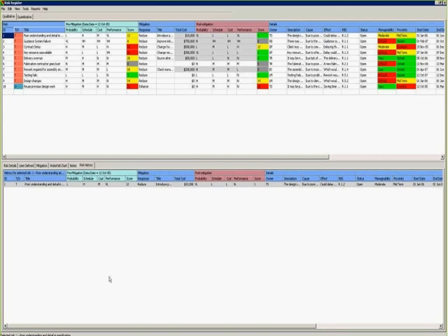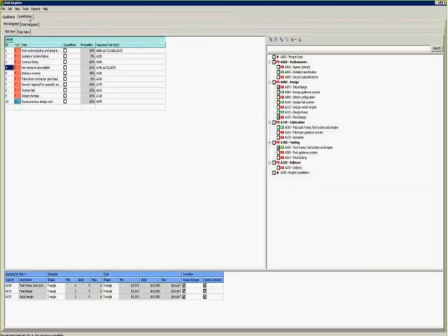What the beauty is about PRA is that it will enable you to tie those qualitative risks with impact back to your quantitative plan. So we can go here in the probabilities, which we can set the weightings for each one: very high, negligible, 10, 30, 40, 50%. And it will change the score, and it will color code it automatically based on your risk matrix that you define elsewhere.